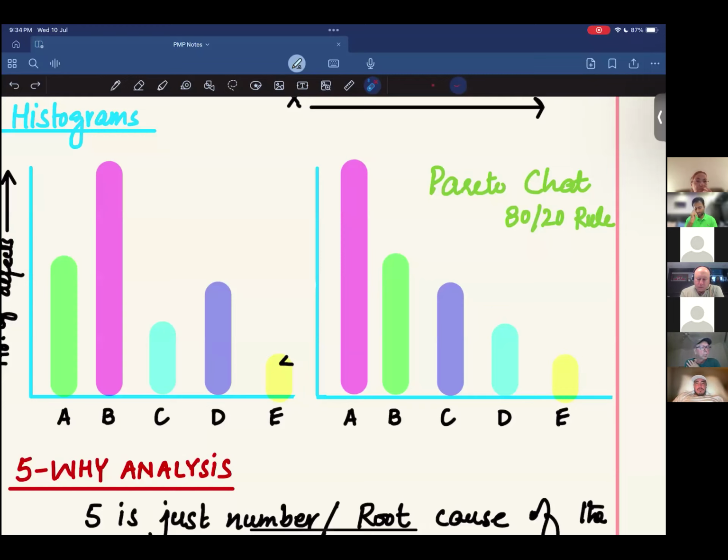So yes, you can say that, but actually it's more like prioritizing defects, right? You have different types of defects. So rather than identification, it's more like prioritization. You take samples and you plot the frequency to see which defects are recurrent so that you focus on those.